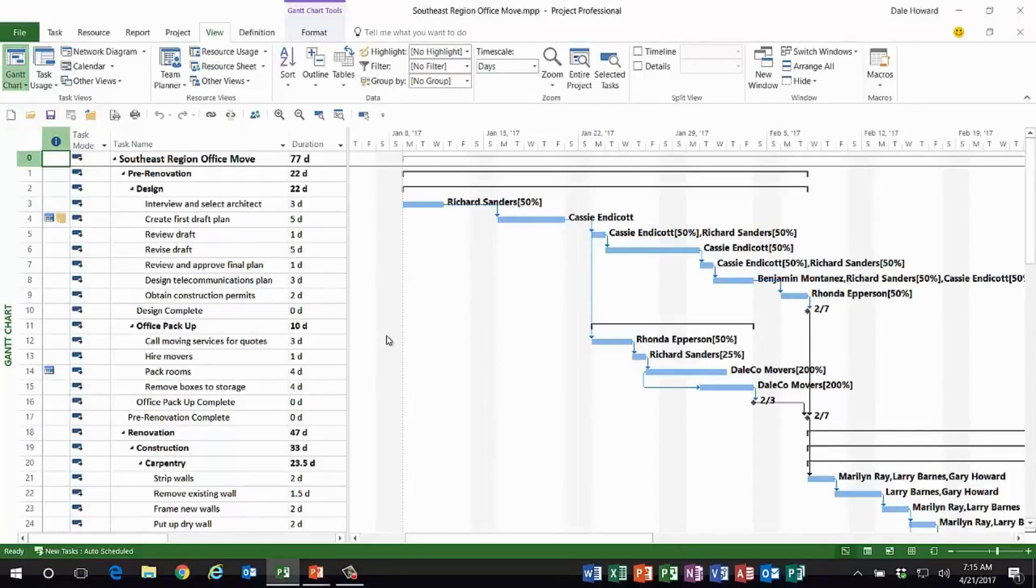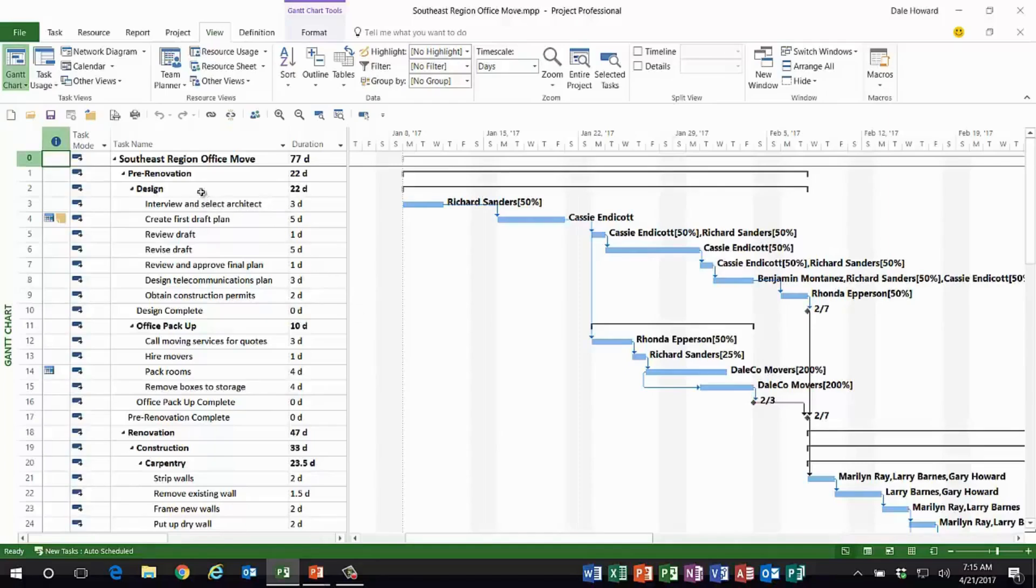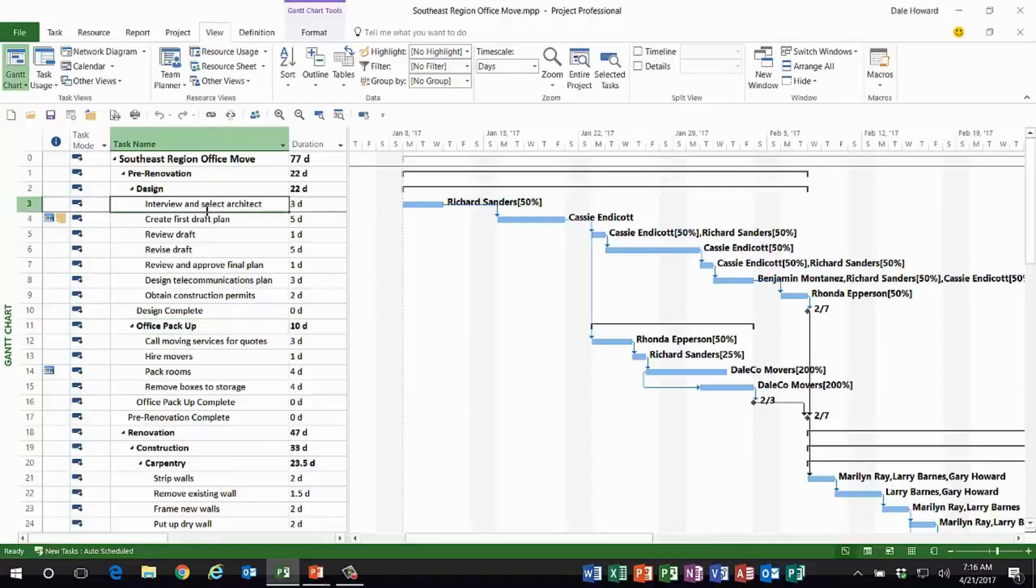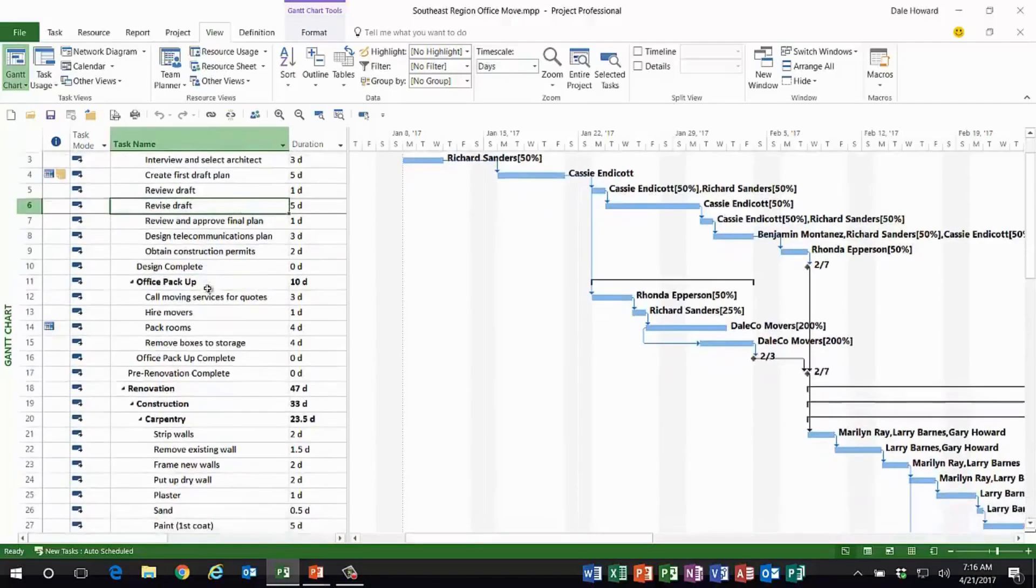you automatically get to see the complete work breakdown structure of summary tasks and subtasks. So in this schedule, for example, we have summary tasks representing phases at the first level of indent, summary tasks representing deliverable sections at the second level of indent, and at the third level of indent, detail tasks.